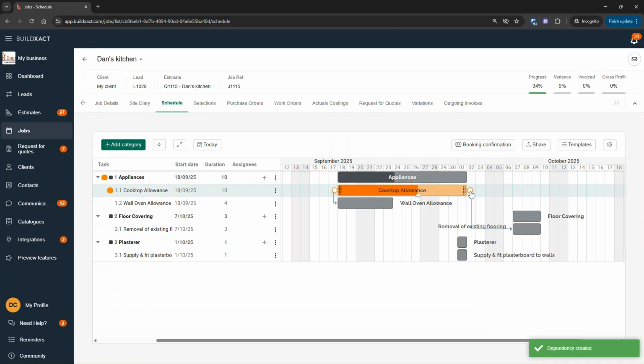The end to start one is better if you want something to be dependent on, hey, if this task gets late, delayed, or over, then push the other ones back. This start to start one is better to make sure stuff starts on the same day, if that's important.